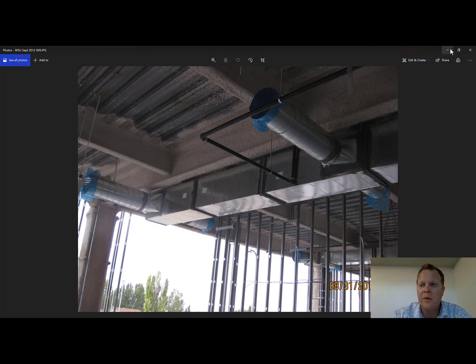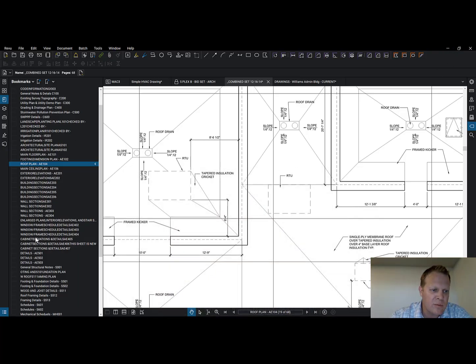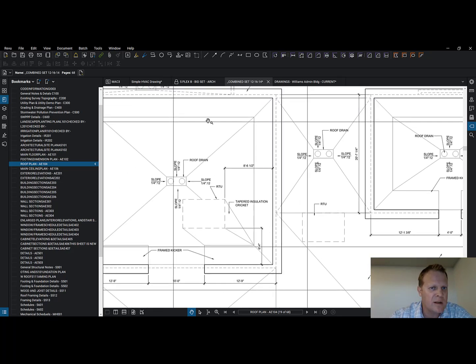Let's go look at that. Oh, maybe not, because not all the walls go up to the roof, because there's a big plenum space. But maybe they go up, but they don't sheet them past the ceiling space. Maybe they don't put drywall on them. So anyways, for framing sequence, above ceiling is usually highest to lowest, the roof is the sequence of construction. So just like my picture there, maybe the highest thing up there is the sprinklers, and then maybe the duct.